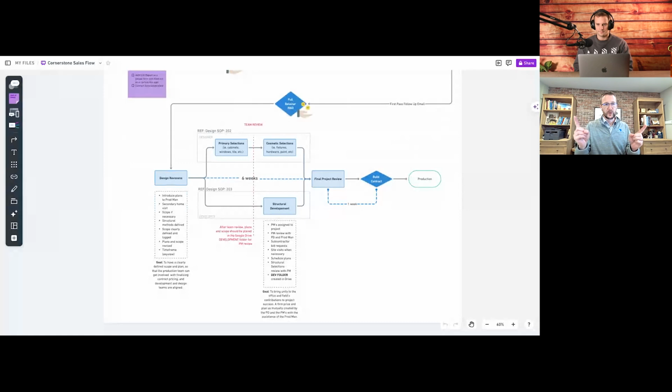Now what we do is a formal measure after they pay the full retainer. We know they're moving forward. Now it's worth sending our architectural designer out there, but guess what he's now not doing? He's not measuring the entire house. I mean, in some cases he might, but in most cases we've whittled the scope of work down to a very fine-tuned area. So we can say, hey, you no longer have to measure the basement and the second floor. Just stick to the first floor, and we're not even touching that front office space. You don't even have to go in there.